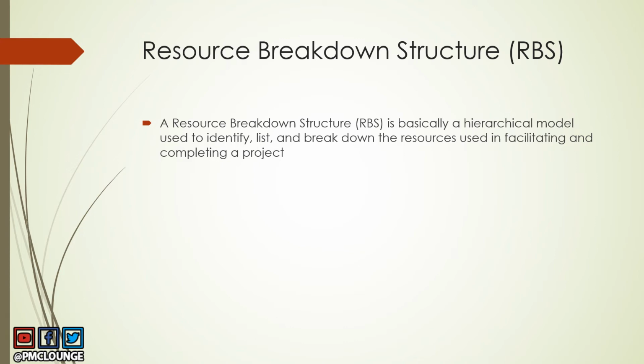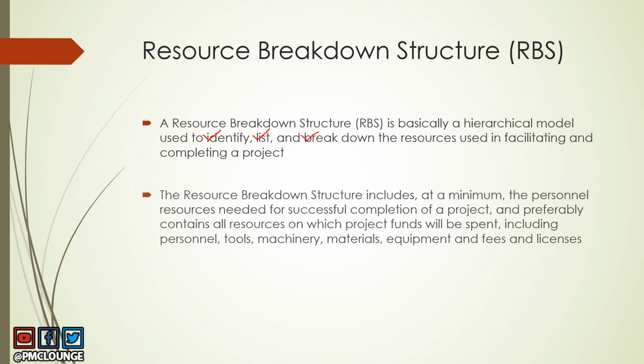It is used to identify, list, and break down. So you need to make sure you understand these three: identify, list, and break down the resources used in facilitating and completing the project. So what are the resources that you would need to complete a project? You need to identify them, you need to list them, you need to break them down into their hierarchies, right? So this is what RBS is used for.